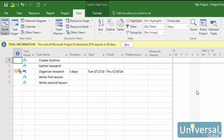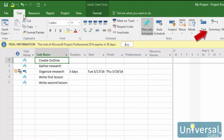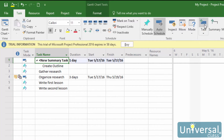To create a summary task, click to select a cell in the Task Name column. Typically, this will be the very first cell under the Task Name since summary tasks are above other tasks. If you already have a task listed first and want to insert a summary task above it, that's okay too. Just click to select the task that you want to place below the summary task. Next, go to the Task tab and then click the Summary button in the Insert group. As you can see, Project 2016 inserts the summary task. Click inside the cell to name the summary.